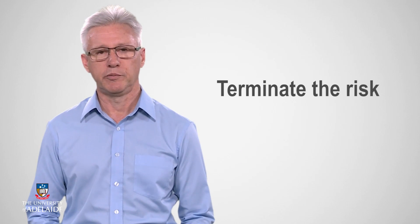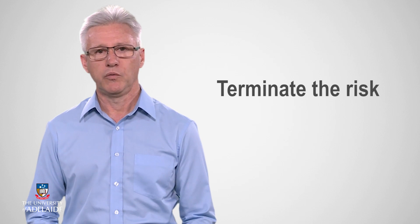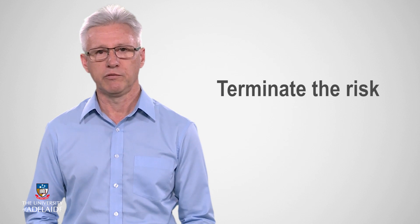The fourth response option that you can consider is to terminate the risk, which means that you have decided to eliminate the risk completely. This can be done by changing an inherently risky process or practice to remove the risk or, for example, changing the project scope. If an item presents a risk and can be changed or removed without it materially affecting the business, then removing the risk should be the first option considered rather than attempting to take, treat or transfer it.